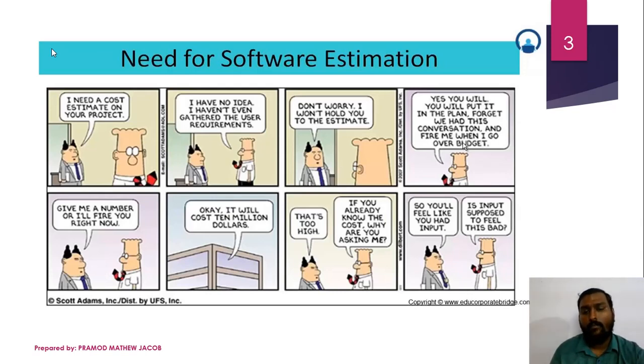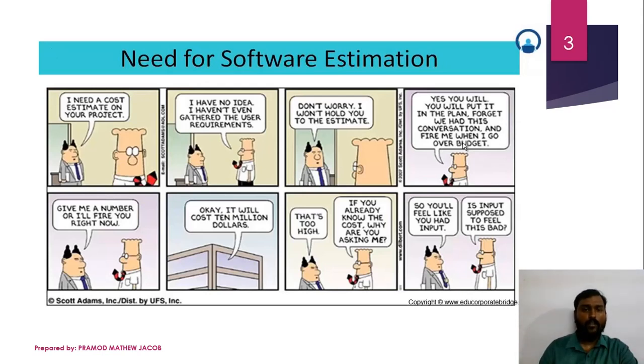Then again the project manager says that that is too high, it is uneconomical, we cannot afford that. Then the system analyst or the developer says that if you already know the cost, then why are you asking me to estimate? So from this conversation we can identify the following problems in an IT industry. One of the main problems is that the project manager will force the system analyst to give the estimate before getting all the user requirements. The second problem is, though the project manager is forcing them, they cannot give an